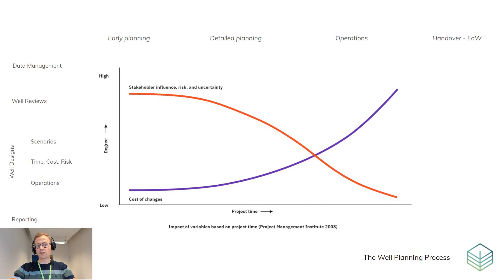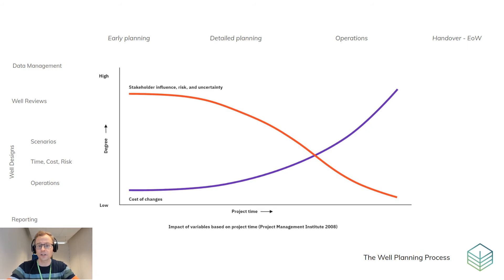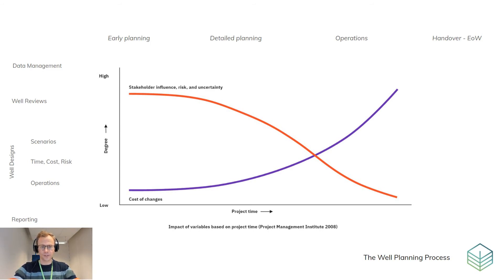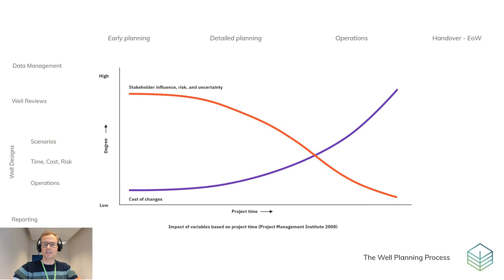Operations is where our industry is hurting today, because we tend to make way too many decisions in operations. The operation crews have enough on their plate handling rig machinery, fluids, and drilling operations. Well plans should be complete with all contingencies and alternate designs. Over and over again, we see engineers redesigning wells while the rig is waiting, due to limited investments on the left-hand side of this chart.